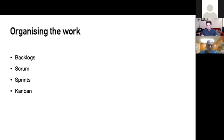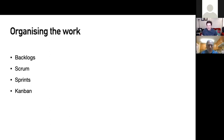Having a well-structured backlog is probably the single most productive thing your team can have — everyone knows what they're working on and everyone is working on the same thing. Common techniques for moving through the backlog include agile methodologies. Scrum is a quite structured approach where you work in sprints — typically two weeks or a month. At the start of each sprint you plan the work, at the end you do a retrospective and plan the next sprint. Kanban is more fluid — rather than sprints, you have a continuous flow: when you finish the top item, you move it to done and pull the next one.